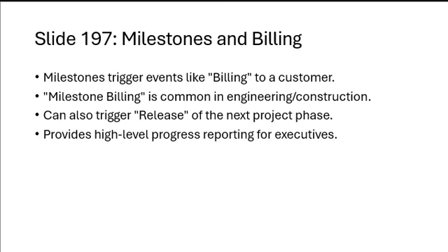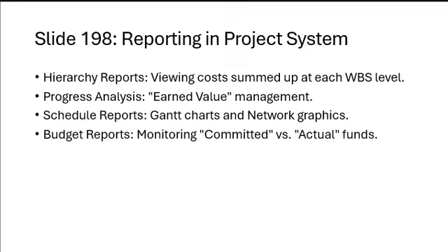Next we have milestones and billing. Milestones trigger events like billing to a customer account. Milestone billing is common in engineering and construction projects. A milestone can trigger release of the next project phase, provide high-level progress reporting for executives, ensure the customer is billed according to project achievement, and strengthen financial control during project execution stages.